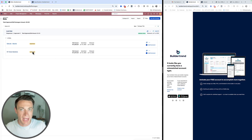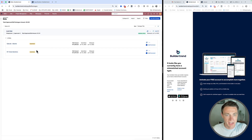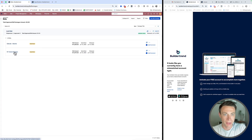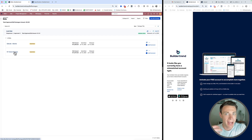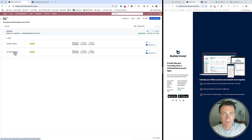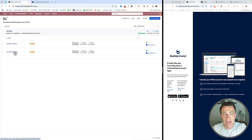I should want my subs to use the system, but if they don't, we can still do it — they can email it to me and then my team can look at it. I can look at these bids, decide what I want to do, and this will help educate my estimate. We want to look at these bids, consider them, and make a selection. My rule is that this is all us as the GC — we are the ones making the decision. This is not necessarily something we're sharing with our customer. For that, that's a selection. A good example would be HVAC — we often bring HVAC into a selection because there are a lot of options: stick with radiator heat, switch to forced air, or mini splits. There are a lot of options that the client has input on.